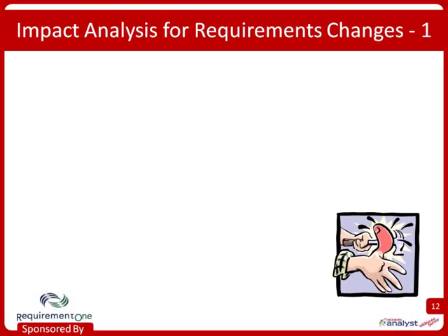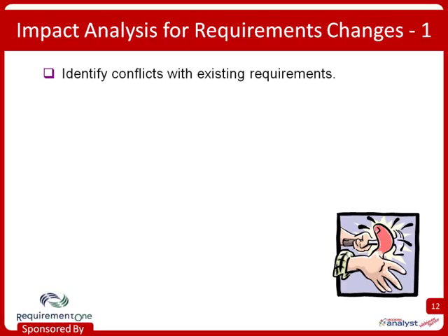So that project team threw out several labor months worth of effort on a change request that was withdrawn simply because they hadn't done enough impact analysis to realize just how big this thing was. So we have to make good business decisions. I have, at the goodies page at processimpact.com, an impact analysis checklist and a worksheet that can help you go through this kind of thought process. And a few of the items from the checklists are shown here.